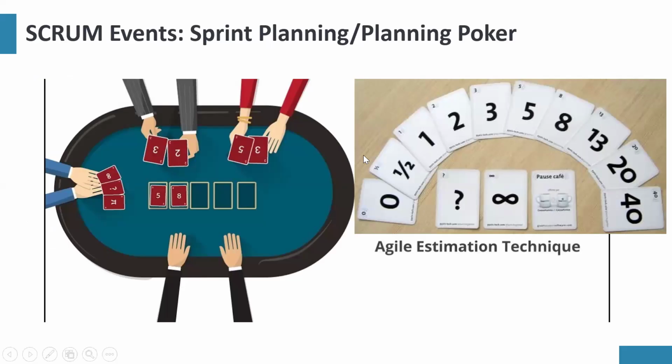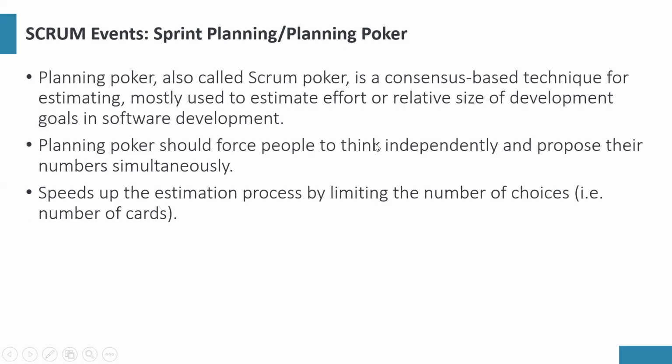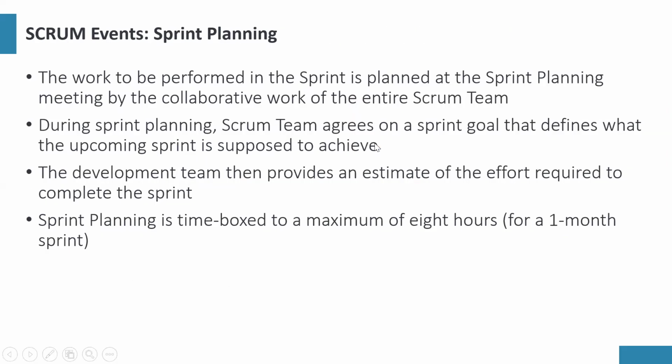Now, remember what we said, that sprint planning is time boxed to a maximum of 8 hours for 1 month.